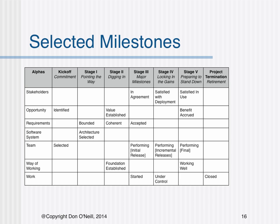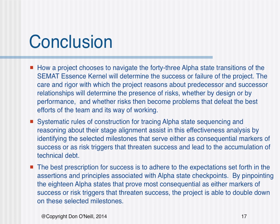Certain selected milestone states serve as indicators of project success. Of the 43 state transitions in the tables, 19 selected milestones provide a critical insight into the health and status of the project. When completion of these states is neglected or postponed, the outcome of the project is placed at risk. The table presents the 18 selected milestone states critical to success on a project. How a project chooses to navigate the 43 alpha state transitions of the CMAT Essence kernel will determine the success or failure of the project. The care and rigor with which the project reasons about predecessor and successor relationships will determine the presence of risks — whether by design or by performance.